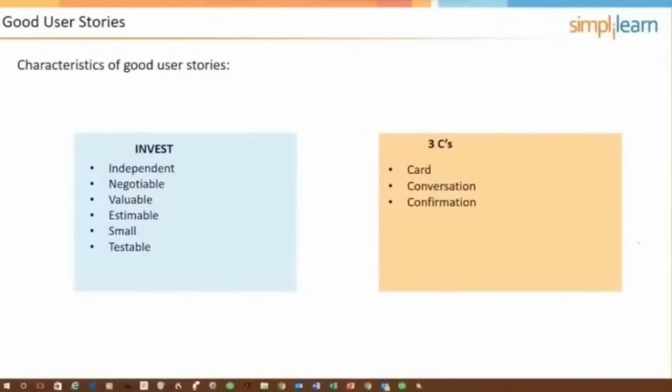Each user story essentially has to have acceptance tests in it. So card, 4 by 6, conversation, that's the starting point. That's where the team and the product owner discuss, and then eventually there will be acceptance tests included on the user story card, to be used during the sprint review to assure that it's acceptable, that there's confirmation.